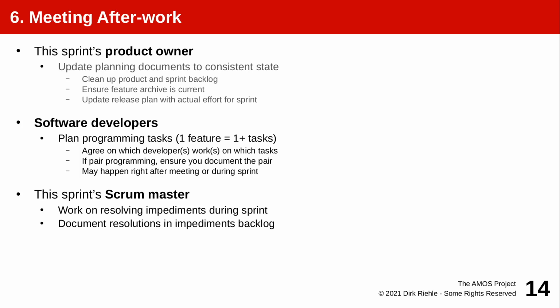For the AMOS project, with 1 week sprints and product owners who are also computer science or information systems or technically competent people, very often a feature in the product backlog is just one task. So if you can cut your features small enough and they speak to developers and customers alike, then there's no need to break down features into tasks in this case. Developers say they want to do that. You're free to pair program, and that's it.